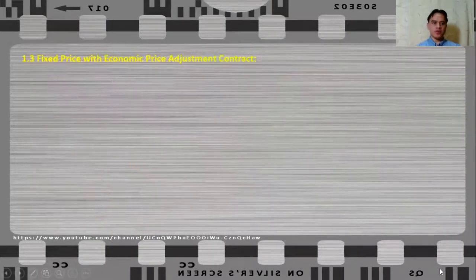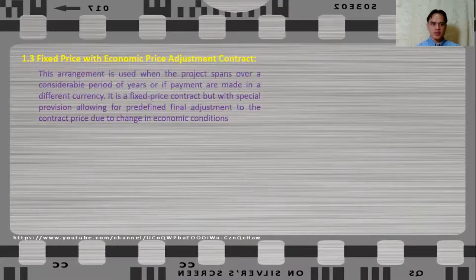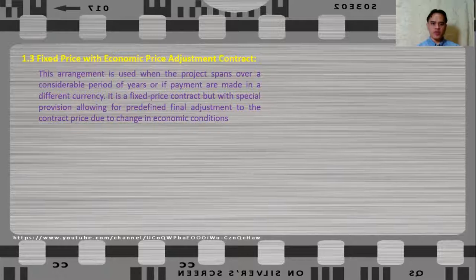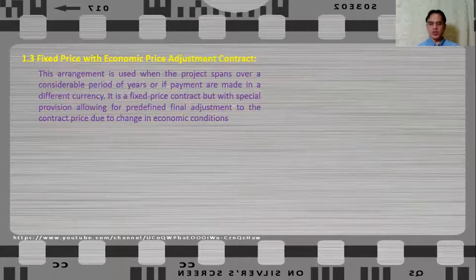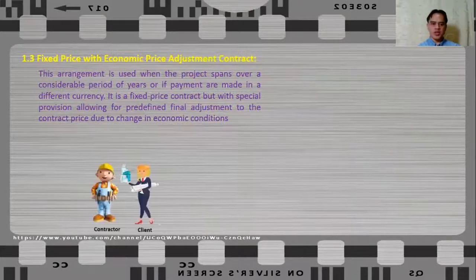Let us now talk about fixed price with economic price adjustment contract. This arrangement is used when the project spans over a considerable period of years, or if payments are made in a different currency. It is a fixed price contract but with a special provision allowing for a predefined final adjustment to the contract price due to changes in economic conditions.